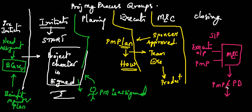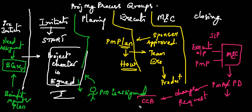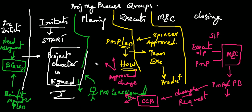If the project management plan equals the output deliverable, you're happy and you move forward. If they are not equal, we submit a change request. This change request goes through integration via a board called the CCB — the Change Control Board. The CCB may approve or reject the change. If approved, two things are updated: the baseline and the project management plan.